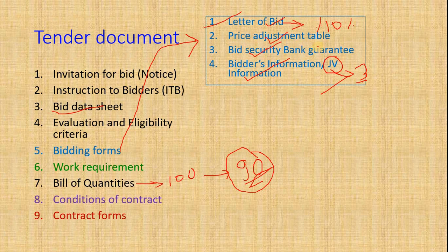The Price Adjustment Table is prepared by the public entity. It is used for multi-year projects — like two-, three-, or four-year projects — and the price adjustment accounts for inflation in material and labor costs.